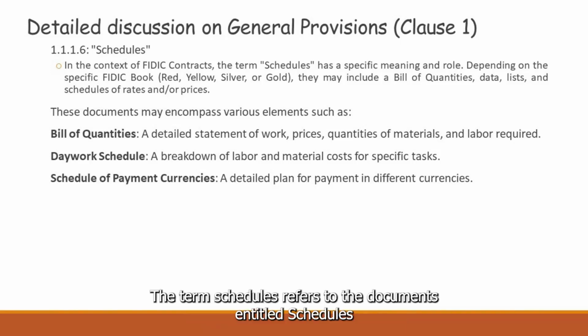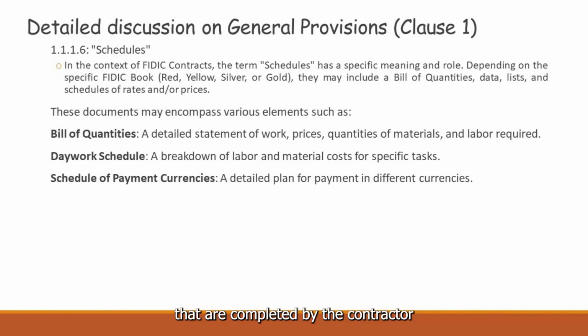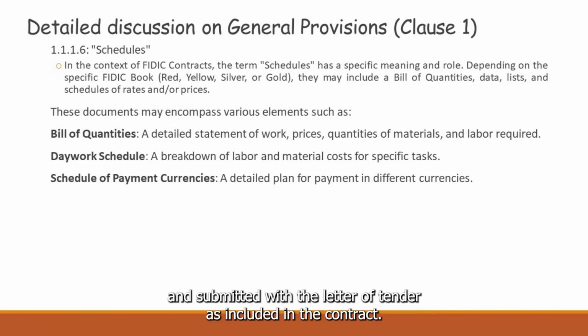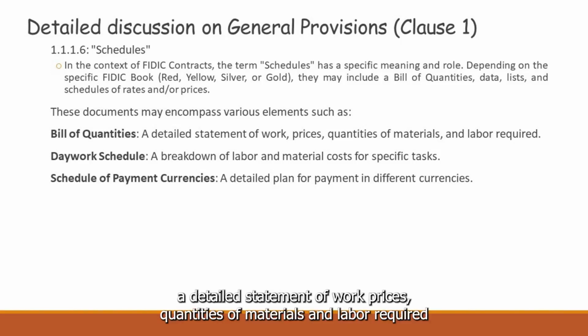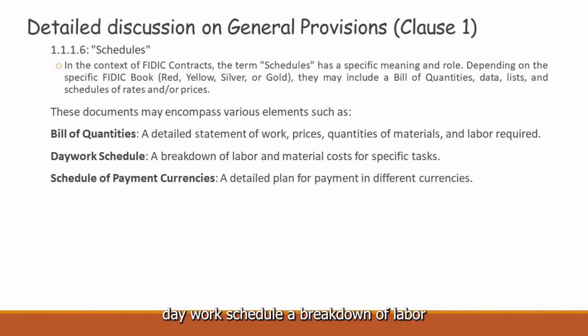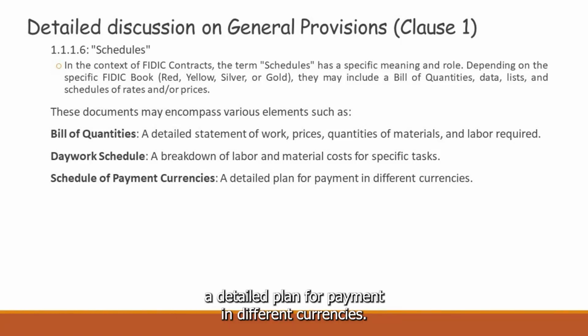The term schedules refers to the documents entitled schedules that are completed by the contractor and submitted with the letter of tender, as included in the contract. These documents may encompass various elements such as bill of quantities, a detailed statement of work, prices, quantities of materials, and labor required. Daywork schedule, a breakdown of labor and material costs for specific tasks. Schedule of payment currencies, a detailed plan for payment in different currencies.